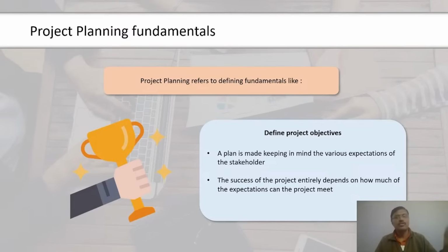As I spoke about the stakeholder register, here also you may need to establish a risk register. But again, it is a dynamic document. As you progress in the project life cycle, new risks will get introduced. Many risks you identified initially may not be there. The probability of that impact may go off. Likewise, new risks will get introduced, and existing risks may have different kinds of impacts.